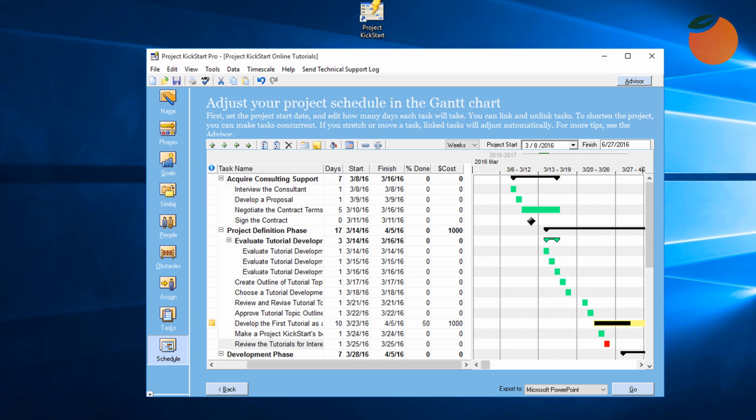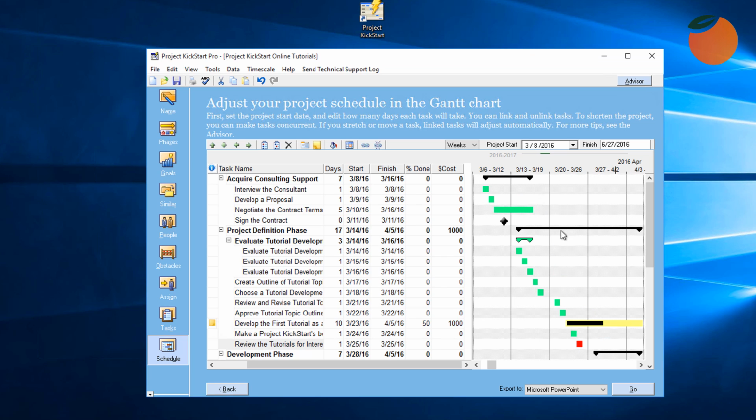Now, borrowing from the colors of a traffic signal, the planner has used green to indicate that this phase is complete. This phase is still in black, but there are tasks under it that have been completed and are green. This task is yellow to show that it is a task in progress, but it's falling behind, and this task, which is in red, is likely to suffer. The uses of color, particularly for task tracking, are limited only by the planner's imagination.